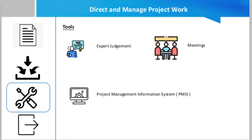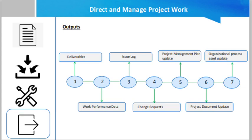The tools for this process include expert judgment, meetings, and the Project Management Information System (PMIS). The outputs of the Direct and Manage Project Work process are: deliverables — any unique and verifiable product, result, or capability to perform a service required to complete a process, phase, or project; work performance data, which is the raw observations and measurements identified during activities being performed to carry out the project work; the issue log; change requests; project management plan updates; project document updates; and organizational process asset updates.